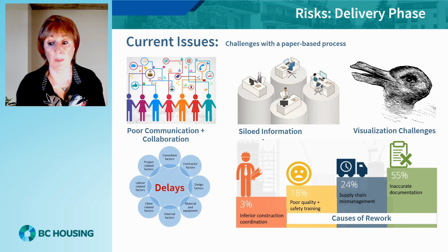98% of projects experience delays, which can be caused by a number of factors: misinterpretation, incorrect construction that requires rework, incorrect or missing information, supply chain delivery issues, incorrect amounts delivered, weather or labor-related factors, or project funding issues. As mentioned, rework is estimated to account for 30% of construction costs. Resolving this one issue would have a significant impact on budget and delivery schedules.